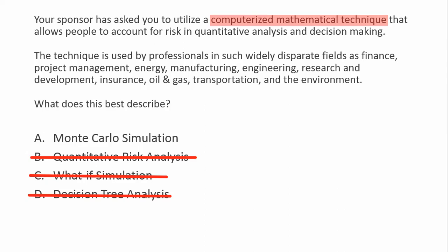Simulation involves calculating multiple work package durations. So what does that mean? You are calculating multiple durations, possibilities for work packages with different sets of activity assumptions. Remember, your work package contains many different activities. And if you're taking a look at each of these activities with different sets of assumptions, constraints, risks, issues, you are going to come up with a number of potential values for those work packages.